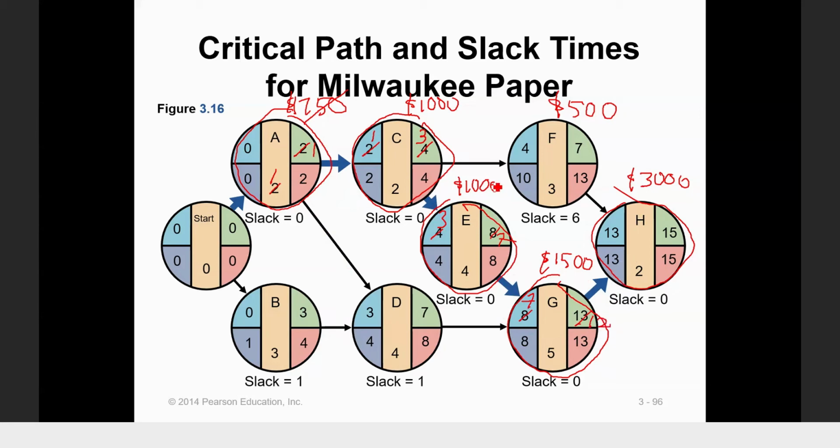Between 12, you have 3 here, so here it becomes 3. So this becomes 6. Between 6 and 12, what is coming here is 12. 12 goes to H, so they become 12. 12 plus 2 becomes 14. So now we have successfully crashed to 14. So we have to update all this backward. 14 minus 2 becomes 12. So it also becomes 12 here.